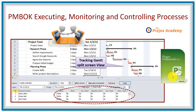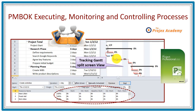I'd be remiss if I didn't quickly remind you of two other important process groups: the executing and monitoring and controlling processes. Here I've shown something called the tracking Gantt split screen view. For each activity you have two bars — the lower grey one is your agreed baseline, and on top it shows your actuals. As activities happen, these part company in the timeline and you can see any variances to the schedule. With the split screen view you can look at the resources assigned to each activity, update those, and Microsoft Project will show you automatically what the result would be — very powerful as part of change control.